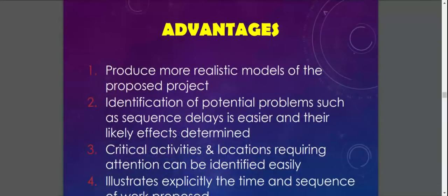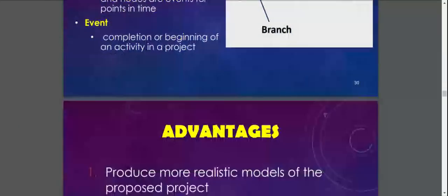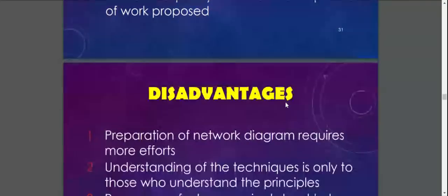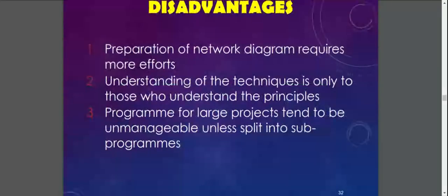So these are the advantages of using network analysis. The project network produces more realistic models of the proposed project. Identification of potential problems such as sequence delay is easier and their likely effect determined. Critical activities and locations requiring attention can be identified easily, and it illustrates explicitly the time and sequence of work proposed. While some disadvantages of project network: preparation of the network diagram requires more effort.